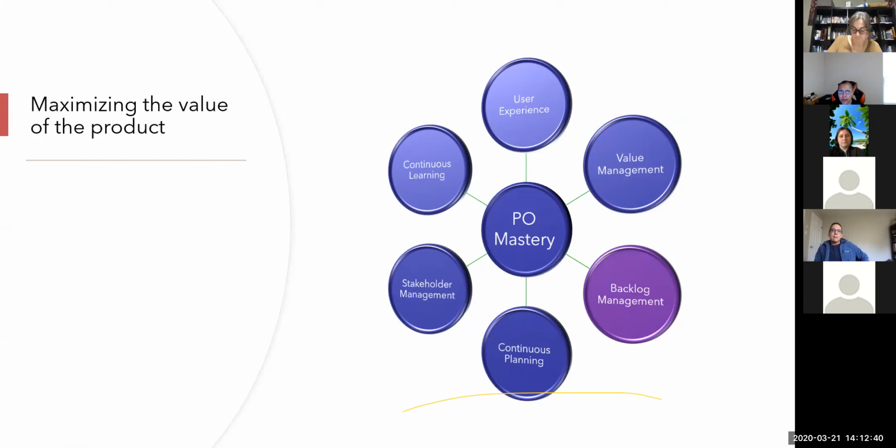Case in point, there was a scenario that would probably happen maybe 1% of the time, and they were uncomfortable with something failing and they wanted to fix it, and the product owner was like, I don't need that. That's not where the value is. We'll handle it if it happens, because statistics show it's only going to happen 1% of the time. I'm comfortable with having our end users be a little bit uncomfortable 1% of the time.